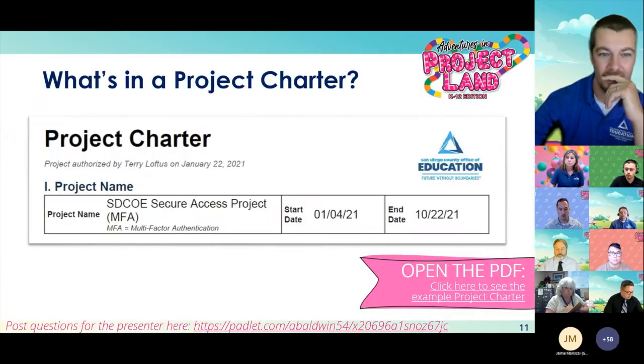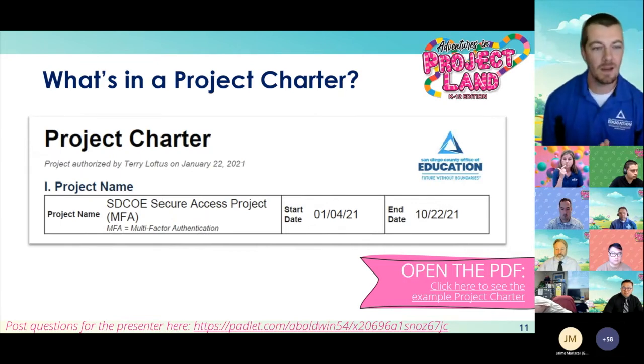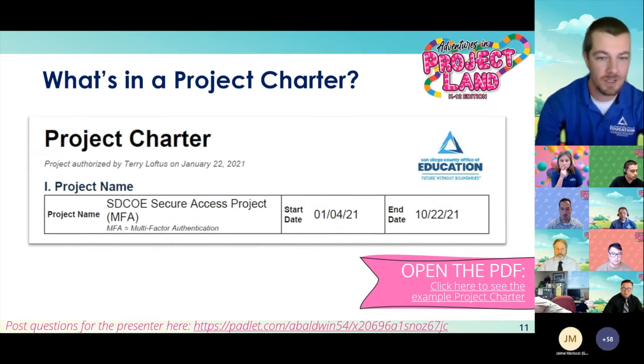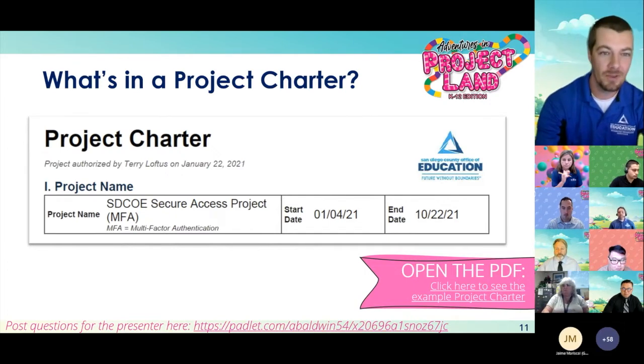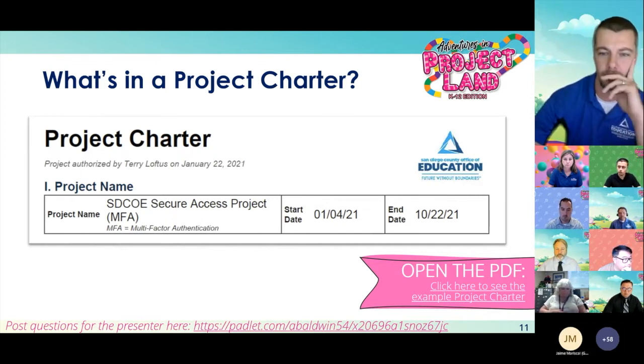So let's dive into what's in a project charter. Now, if you want to see the actual project charter, this is the real project charter from our multi-factor authentication project. You can click that PDF link and follow along. If not, you can just watch the slides. We're going to cover every little bit of it. It starts off with the project name, the expected start date, and the expected end date. Now, I know these dates change, but the point is to do our best guess at the beginning and start with some sort of plan that we can work with.